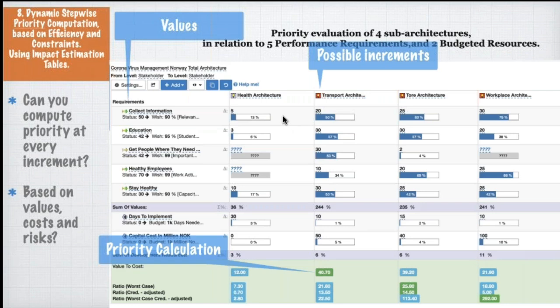Okay. Now, here it is. When we estimate, say, 50% here, there's a little table, and it says plus or minus how much. And we think about it and say plus or minus 10%. In other words, it could be between 40 and 60. We're saying there's a risk that it's somewhere in there.